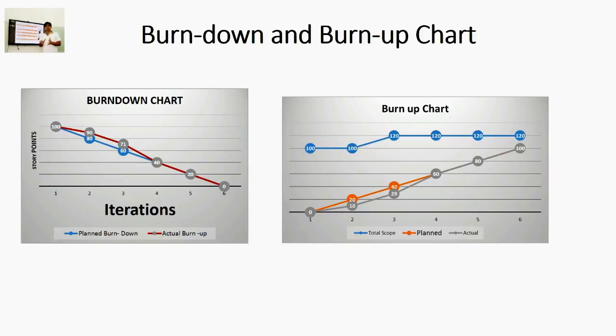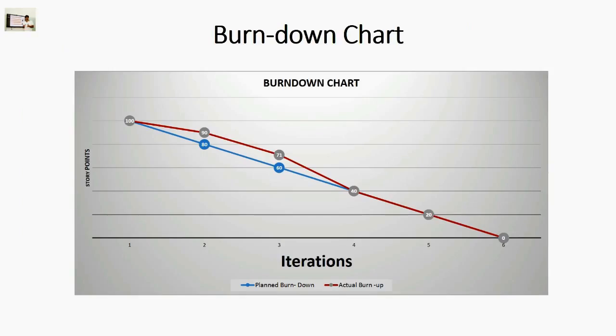Now what you have in front of you right now is a sample burn down chart. If you look at the sample burn down chart carefully, the y-axis represents the scope of project in story points. You can also take story points in man hours. The x-axis represents the number of iterations within a release. In this diagram, the blue line depicts the planned burn down.